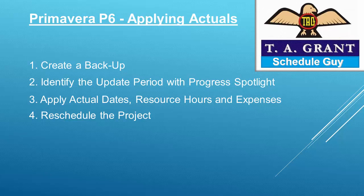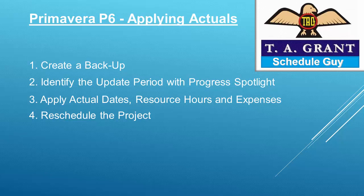Hello YouTube. Today we're going to apply actuals to our P6 schedule. This will involve creating a backup, identifying the period for update with Progress Spotlight, then applying the dates, the hours, the expenses, and finally rescheduling the project.